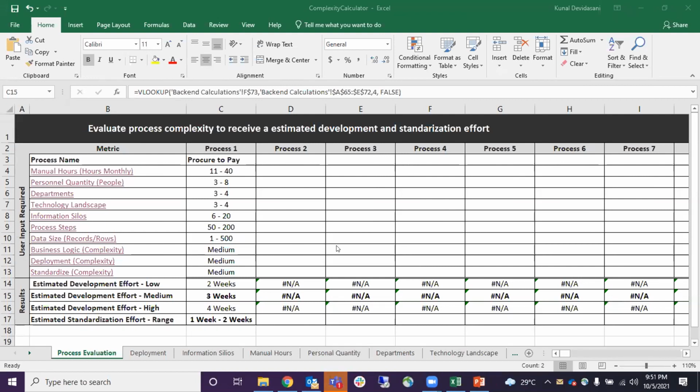The different parameters, setting up the framework. Like in case of UiPath, it's ideal to set up the RE framework before we go ahead and develop, and then actually develop the logic for the process. So the WBS, that is the work breakdown structure, will have the breakdown of all this.